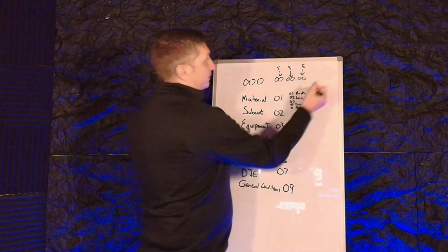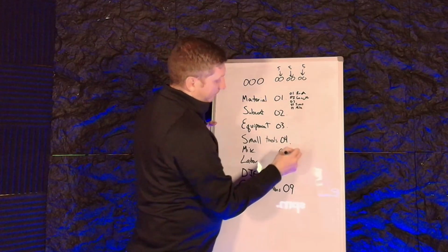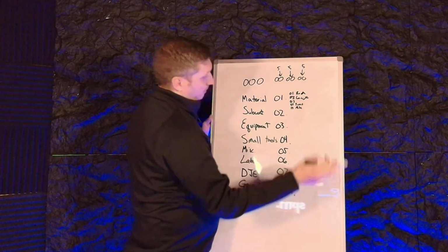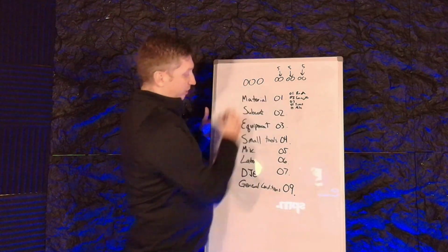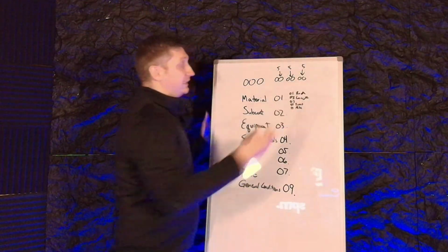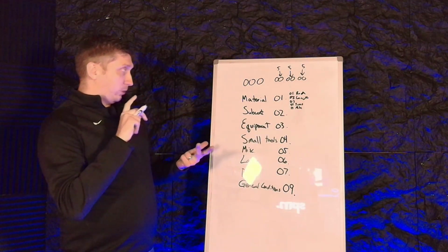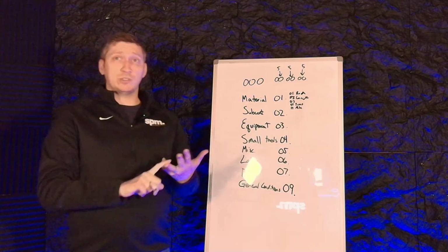Again, you can get into levels later. Think of level 1, level 2, level 3. Level 1 is the general category. Level 2 is the specific category. And level 3, we use it for different ways, but we use it for change orders. We use it for phases of jobs, floors of buildings.